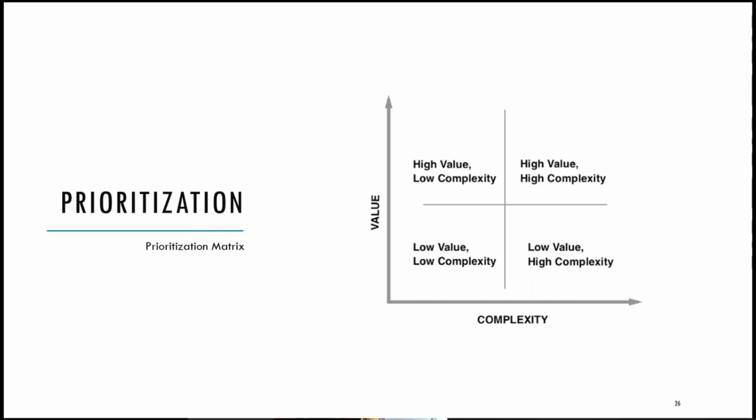You can also use a prioritization matrix, classic with 2 different criteria which you can choose. Here you see value and complexity. Cost is also an often used one. You always put those criteria in relation to each other and see if there's anything which has, in this example, a lot of value but a small complexity. These are requirements easy to implement and to have quick wins. So a good start for everyone. Maybe you should think twice about requirements with a low value and a high complexity. Are they really necessary or could they go out of scope?